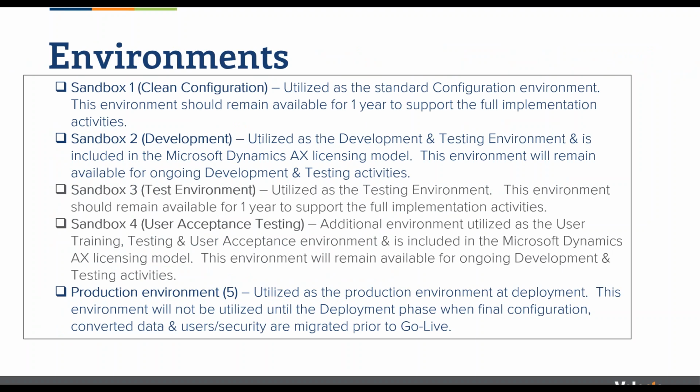All right, so you'll notice that I use the word environments and not environment, and that's because it takes several to actually bring one of these projects to fruition. So this is an example. This is typical, but not gospel. This does change a little bit from project to project, dependent upon the needs. I've seen as few as 3 environments on implementation projects, and I've heard of one project that had 9 different environments running, mostly based on how many different development environments were needed. But we will create additional environments based on the purpose that they're used for during the implementation.